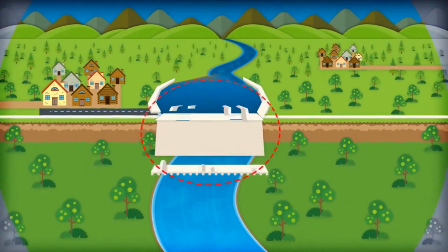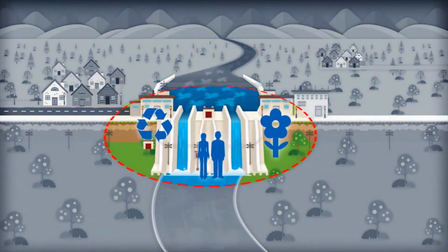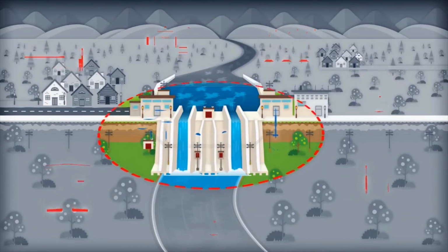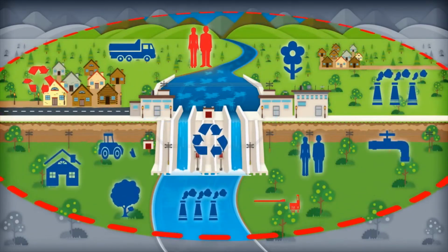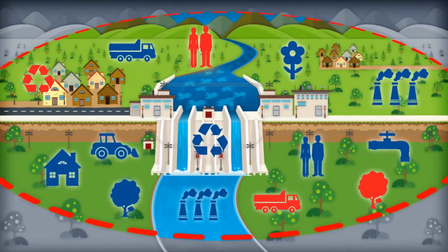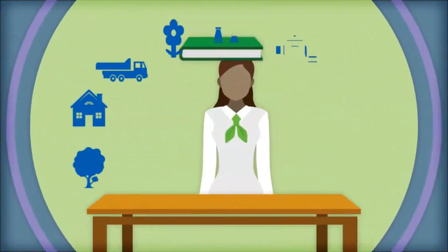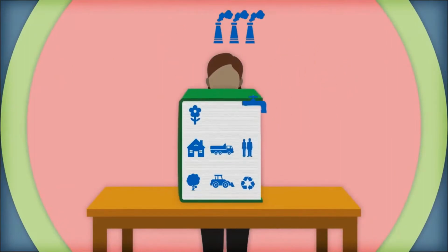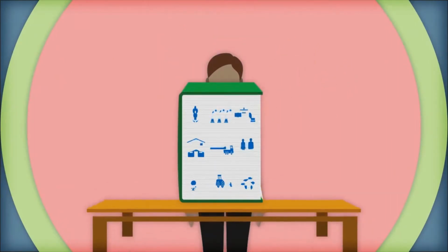If the scope is too narrow, the EIA might overlook significant impacts that are not necessarily obvious but real and possibly negative, or leave out stakeholders who would be affected by an activity or project. If the scope is too broad or unclear, the EIA can become overstretched and overburdened with irrelevant issues, require unnecessary efforts, and distract from the analysis of key issues.